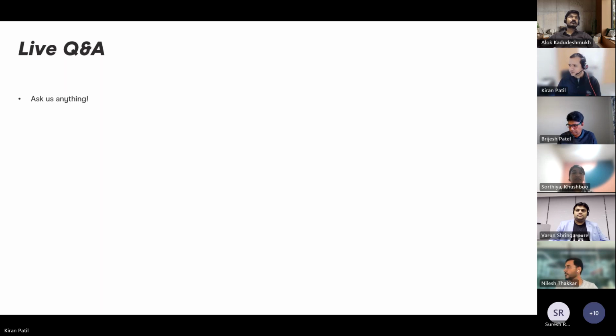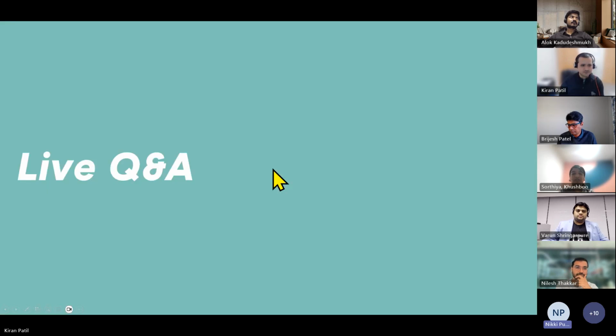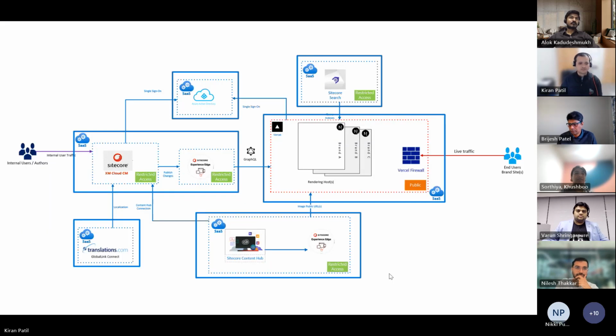Did the Sitecore XM Cloud upgrade affect any of your current website or cause downtime? You should not see that, because XM Cloud is a separate environment, right? So you will be installing or doing the migration on the new environment. So your current environment is still up and running. And then once your XM Cloud is ready and Vercel or Netlify is ready, you do a DNS switch. So I don't expect any downtime in the standard setup.